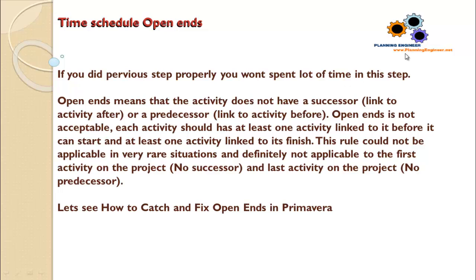Open Ends means that the activity does not have a successor link to the activity after, or a predecessor link to the activity before. Open Ends is not acceptable.